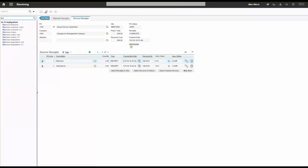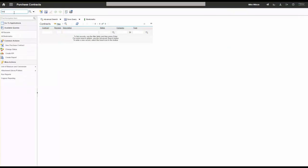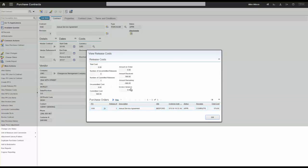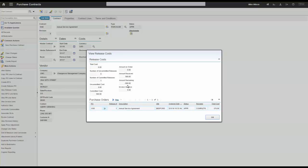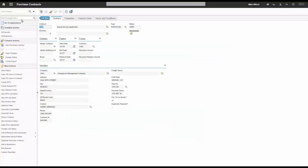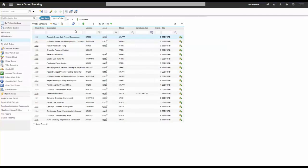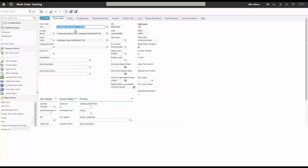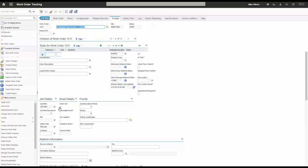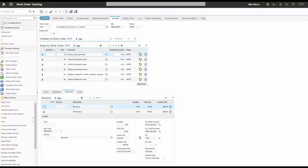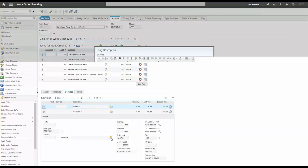Going back to the contract and reviewing release costs, I can see the amount received is $560. If I had set a million dollars, it would just decrement that down — a nice way to track ongoing spend with this vendor. Going to work order 1211 and the Actuals tab, there are no labor entries since nobody did work from a labor perspective. But clicking on the services tab, because I received those services, they show up here. I can expand a line and see the PO reference, PO line, and date received.